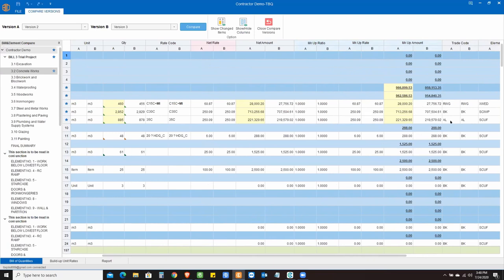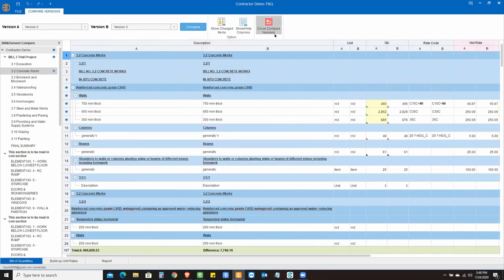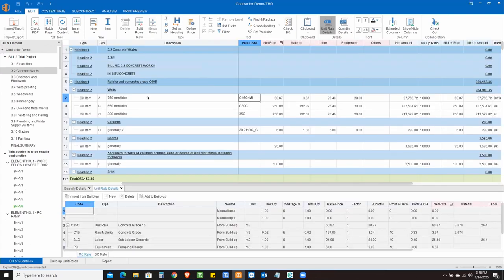particular bill item. So you just made some changes in the model, and you just press calculate, and it took all the data all the way to here until the total project cost. So you don't have to go through each of the spreadsheet and update based on the changes being made in the model. So it's all interconnected, centralized, automatic update in real time. All right, so that's about the comparison between versions. So you can do that between maybe if you're a consultant, between the PTE and your contractor versions and stuff like this. So you can do a lot of comparison there.